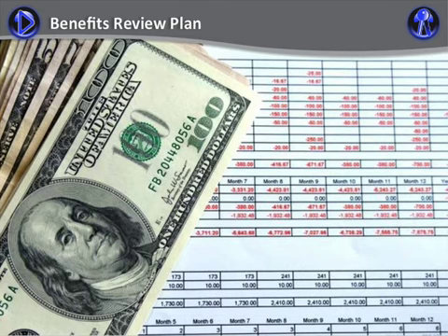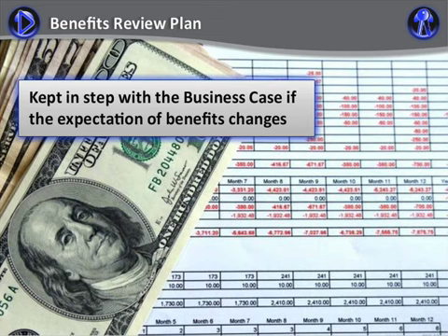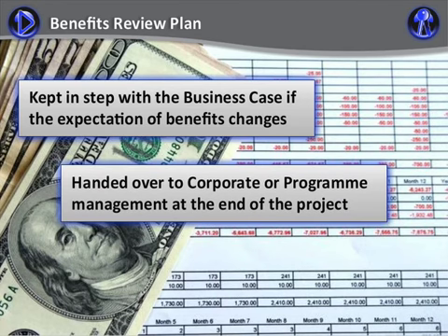The benefits review plan is created by the project manager at the same time as the business case in initiating a project. Each time the business case is updated, the project manager should check to see whether the benefits review plan also needs to be updated to keep it in step with the business case, if our estimate of the expected benefits changes. At the end of the project, we will hand this over to the relevant business area, probably as represented by the senior user on the project board, or if our project is part of a program, we will hand it to the program management team.